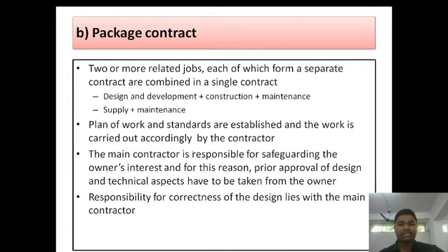Plan of work and standards are established and the work is carried out accordingly by the contractor. The main contractor is responsible for safeguarding the owner's interest, and for this reason prior approval of design and technical aspects has to be taken from the owner. Responsibility for the correctness of the design lies with the main contractor.